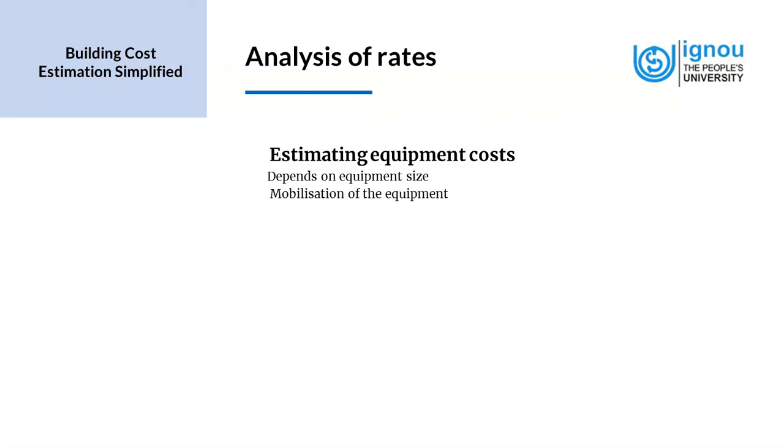Mobilization of the equipment. It may be more cost efficient to keep some equipment on site for an extended period of time instead of renting it out intermittently. It would be a good idea to find out the difference between the cost of renting the equipment versus mobilizing the equipment, because in projects of longer duration, it would be viable to purchase an equipment. Of course, this is from the point of view of a contractor, in most of the cases. But this has an implication on the equipment cost.